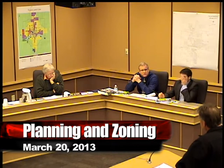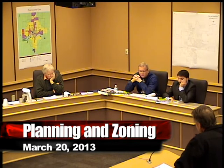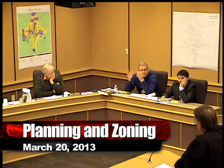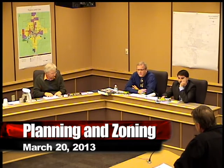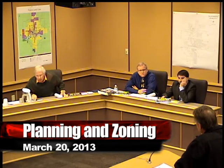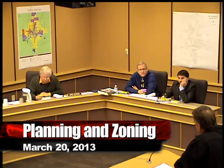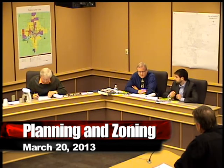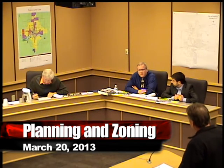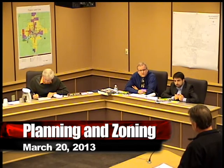As I talked to you earlier this week, the condition would be that the trees would be preserved 10 feet from your property line. All those trees would be surveyed and preserved. They would build a 6-foot opaque vinyl fence or greater quality, and I'll let you discuss that with them, but that would be the minimum standard. And then also the developer will have to provide an electronic gate for you, so you can get in there.